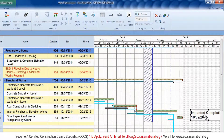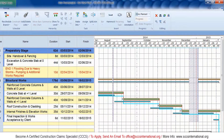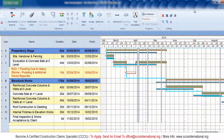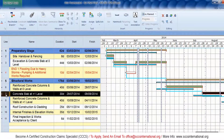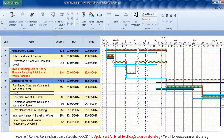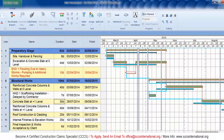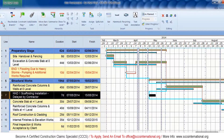Now I'm going to repeat the procedure for the remaining delay events, so please observe the presentation very carefully. We're going to repeat the steps again: insert the delay duration, split the affected activity, and embed the delay event into the affected activity using finish-to-start logical links.